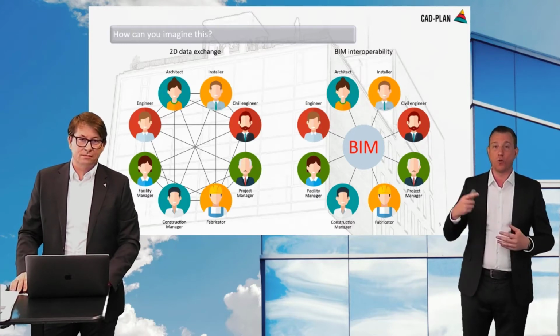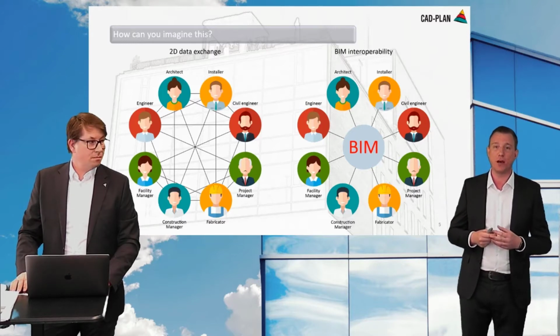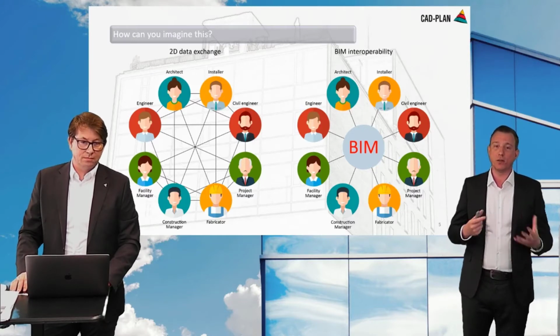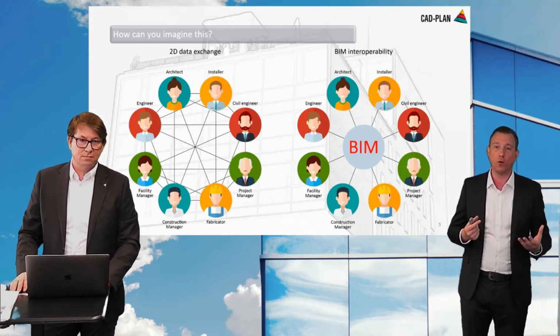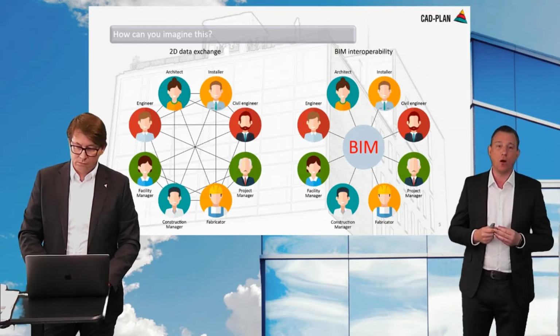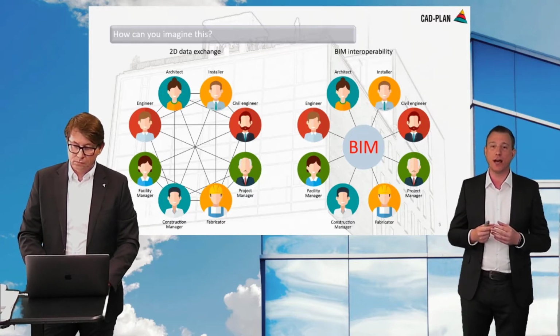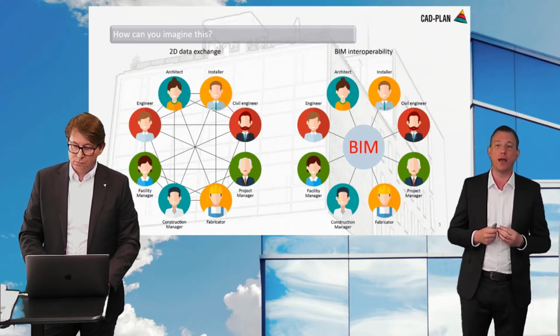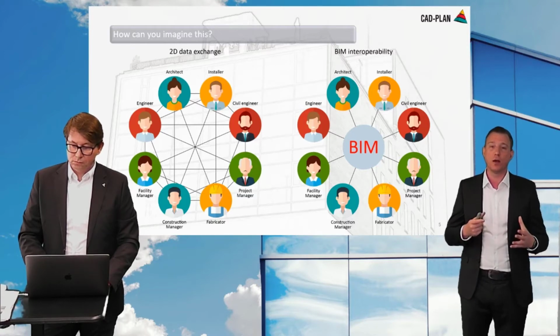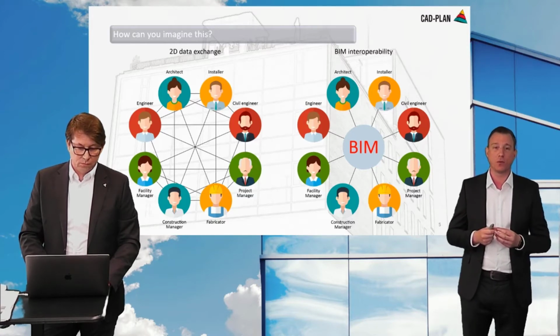In the graphic on the right side, we talk about BIM interoperability. What does it mean? With BIM, it is possible to make the information workflow in such a way that the data sharing is possible together. All stakeholders access a central data environment, and the structure and the depth of the information, called LOIN, is defined at the beginning and is monitored and controlled by BIM specialists.